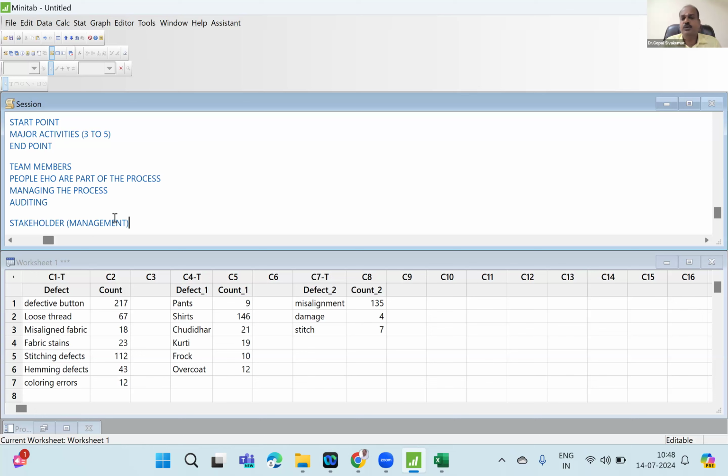All the people who don't want your project to succeed, if you somehow motivate them and also involve them and make them part of your project, maybe all the negativities can be converted into positivities, right? So this is important. If more than 75% of the stakeholders are not really willing to support your project, the project cannot succeed.